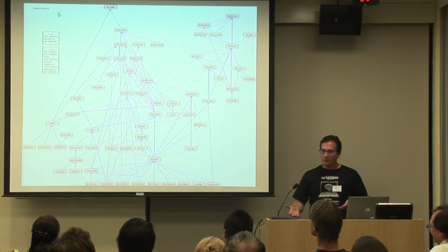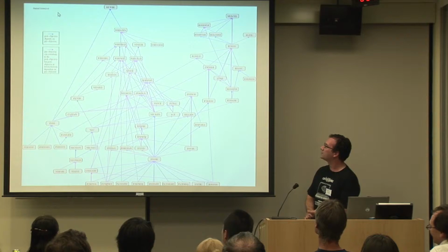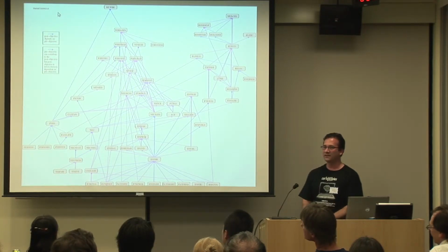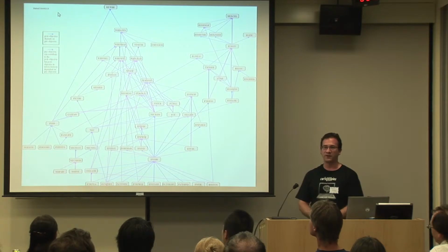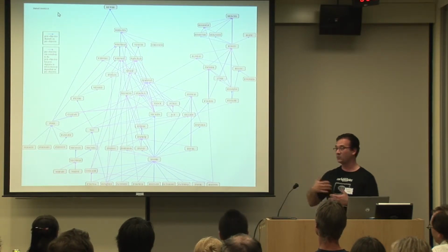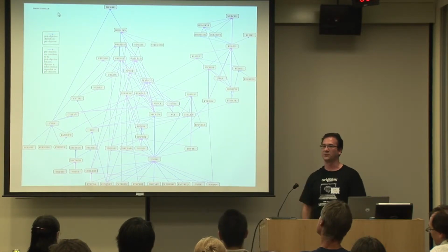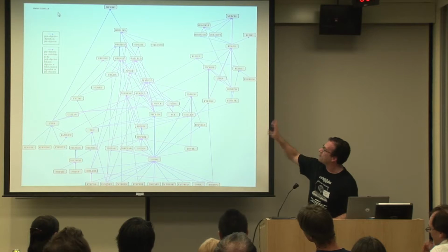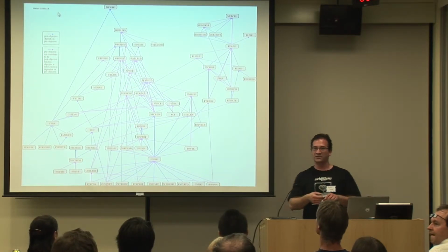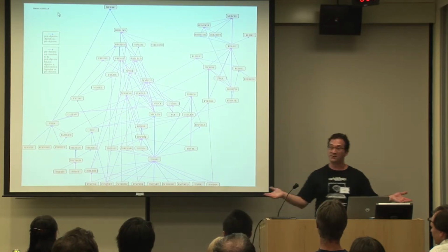And it ties into a method of planning tasks or planning projects that I use to keep track of very large projects. I think that's really the original reason why I developed this thing in the first place, because the projects I was trying to work on were becoming so big that I couldn't just make do with a regular little to-do list anymore. So you had to come up with a way of describing what are your objectives, what are the problems that you have to deal with for each of those objectives, possible solutions, what does that mean in terms of tasks, and then schedule them for the next 5 years.